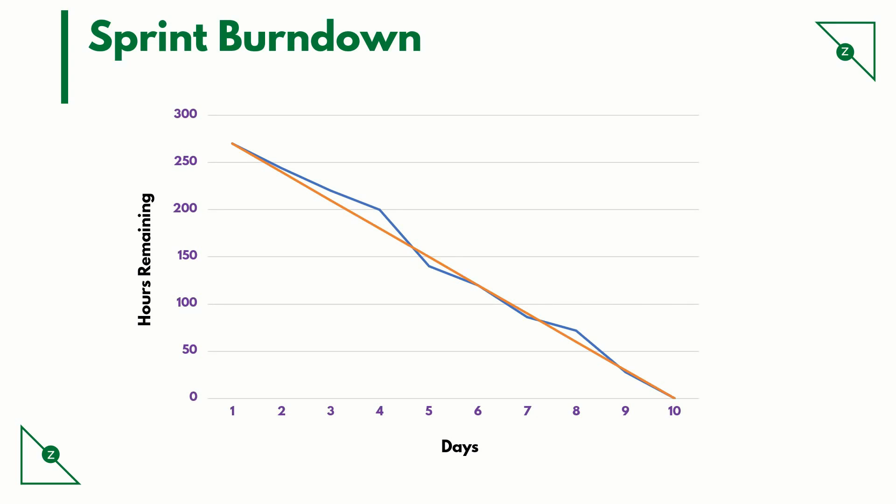The orange line is the ideal curve. The blue line is the actual work being burnt down. You can notice that until day 4, the blue line is above the orange line. This means that the team has not progressed at the ideal pace — they were slightly lagging behind time.